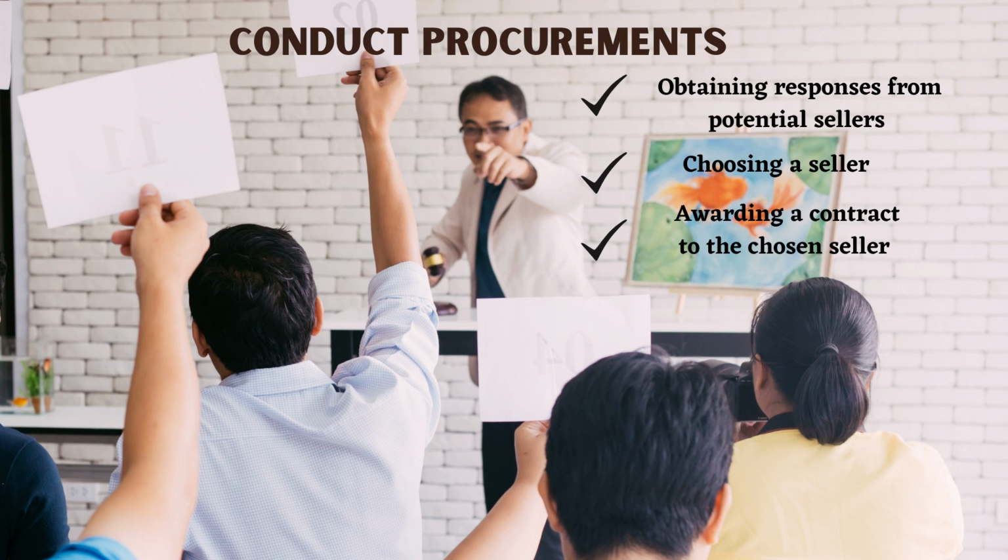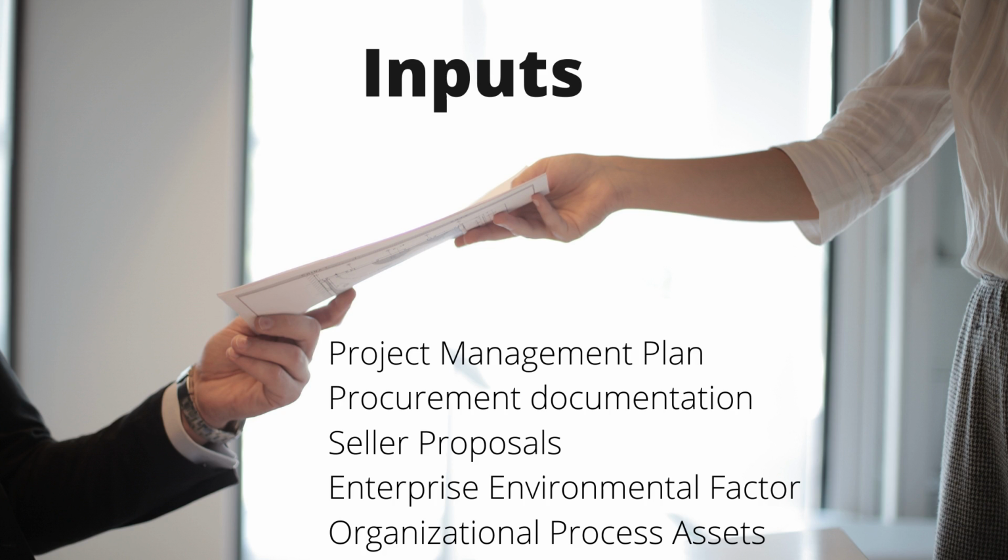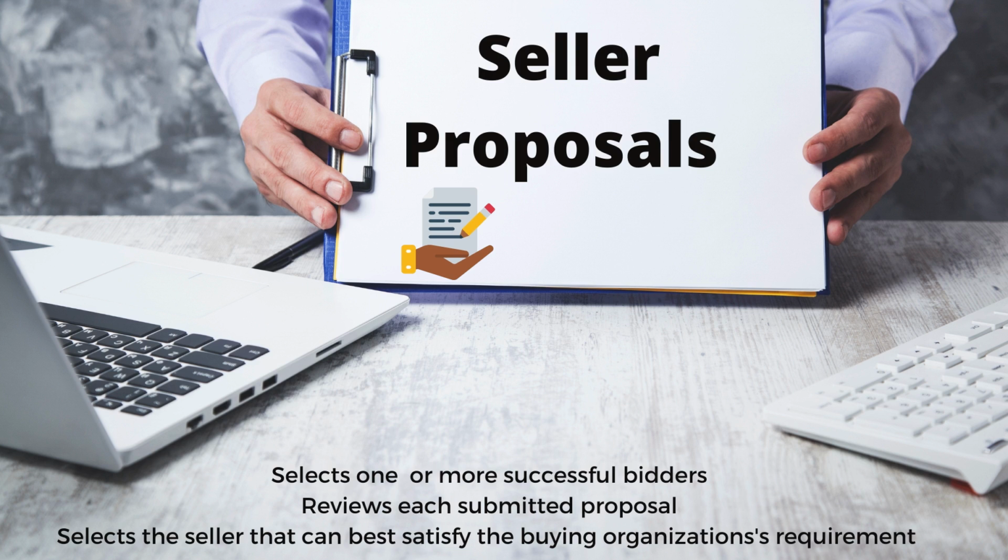Now, let's move on to the next phase of procurement management, which is conduct procurements. This is a process of obtaining seller responses, selecting a seller, and awarding a contract. The inputs for conduct procurements consist of the following: project management plan, procurement documentation, seller proposals, enterprise environmental factors, and organizational process assets. One input we will be investigating is seller proposals.